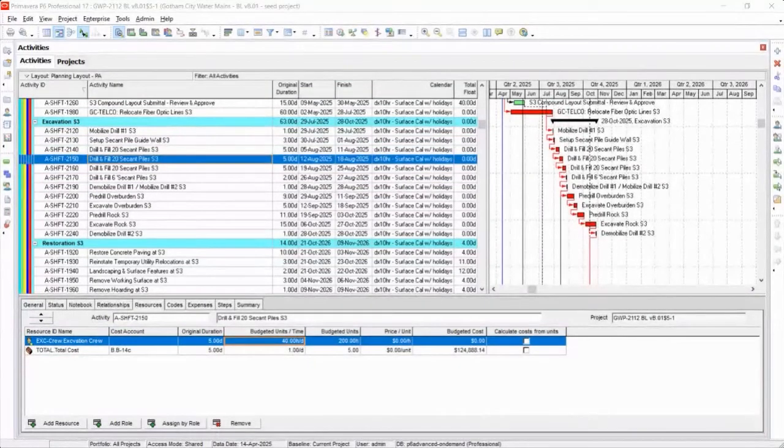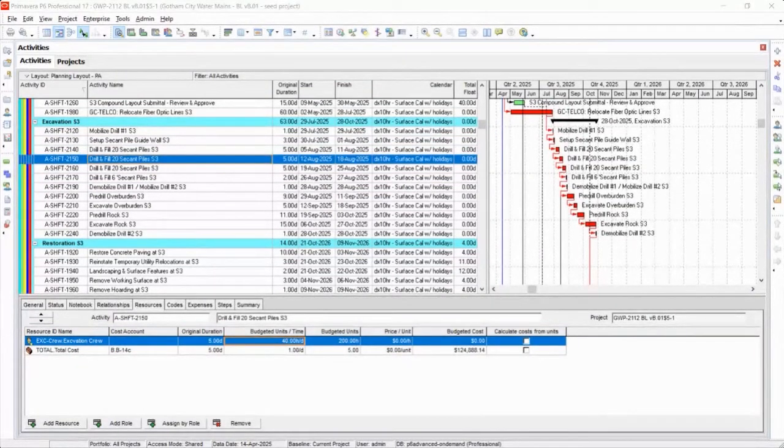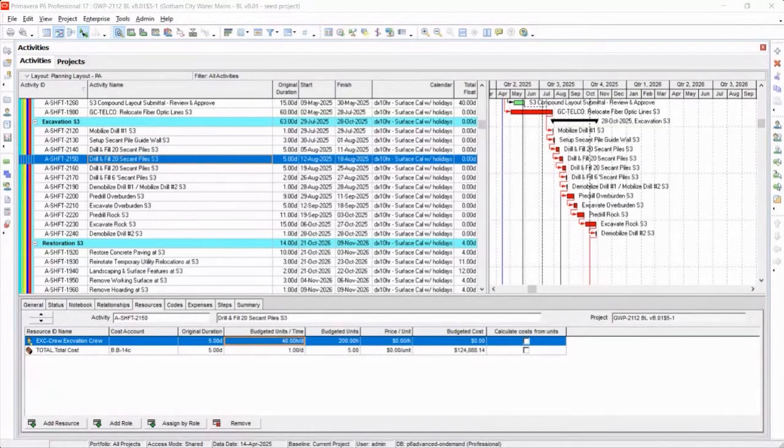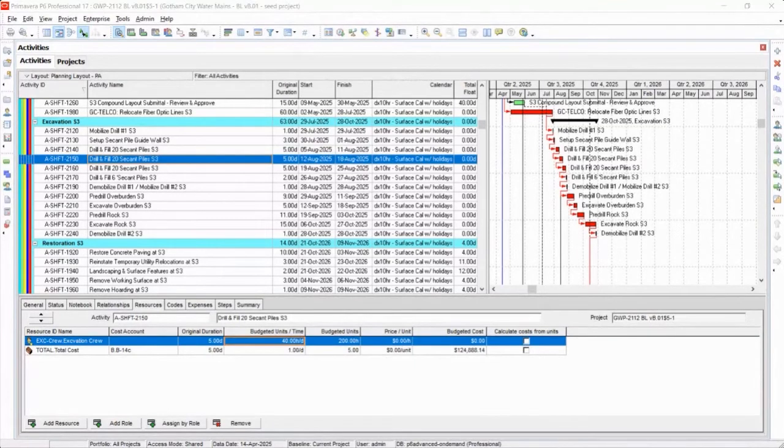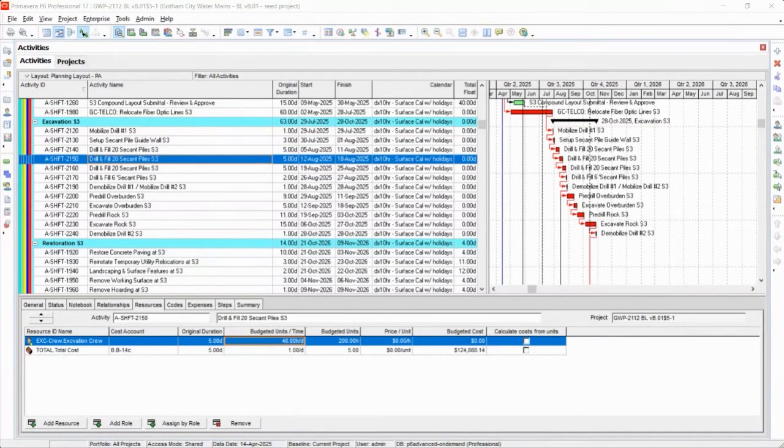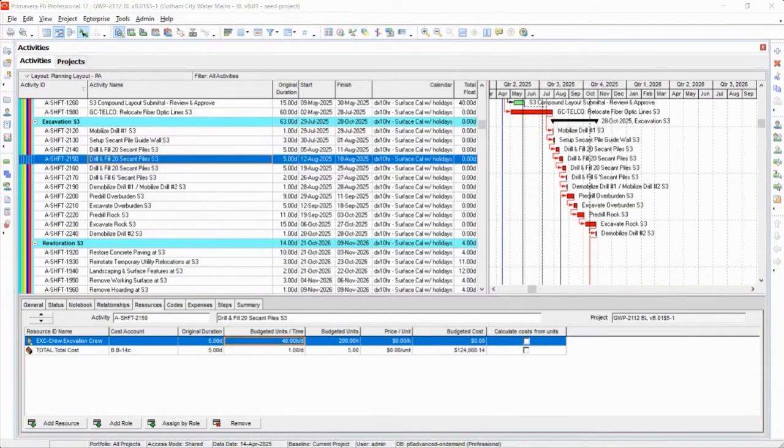Okay, let's go back to the leveler. Yeah, leveler is always a hot topic. On the activity leveler, you said that once you schedule the project after having leveled it, you will lose the changes. Well, if you snap a shot of the project, you can add it as a baseline and then look at the changes it made.